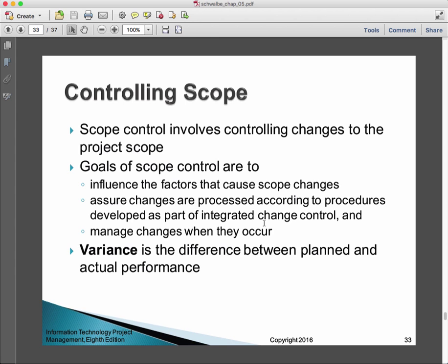In an agile project, we have this idea that at any given time we have the requirements that we have, and if people want to restate them, that's fine, as long as we get the business owner to agree that they should be restated. But the overall scope is going to be defined by how many of the requirements fit into the project, and we're going to discover that as we go from sprint to sprint to sprint.